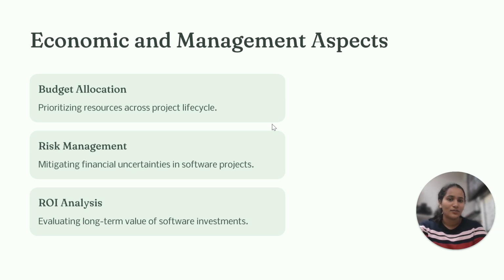Then is the number of users. If there are more users for a software system, then the software system will require more effort. Then is the software system's rate of change. The more frequently the software system changes, the more effort and resources it will need when it comes to maintaining the system, right? Another thing is availability of personnel. The personnel available for the operation should possess the skills and experience in maintaining the software system, which might increase its cost. Then comes the tools and technologies which are used for developing it. So it is another cost driver.